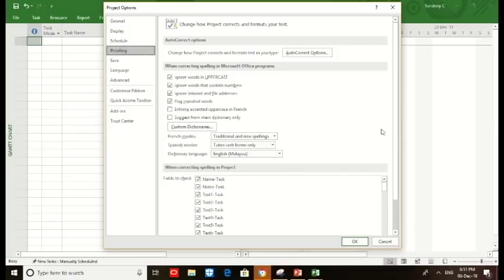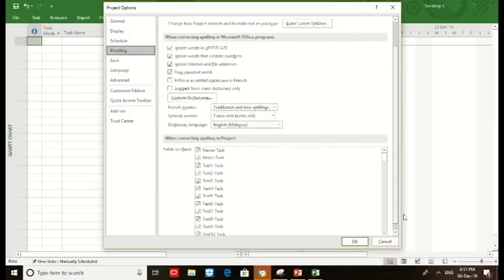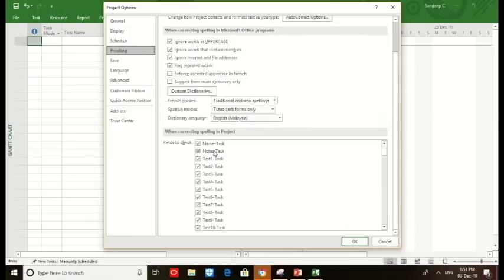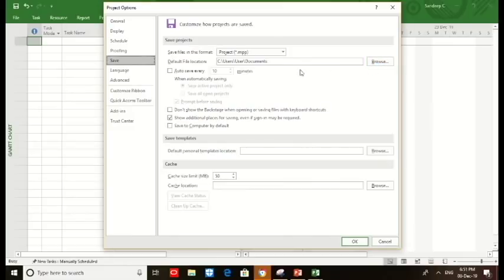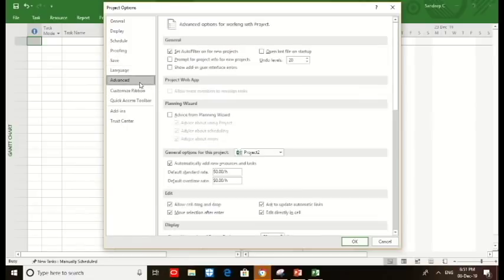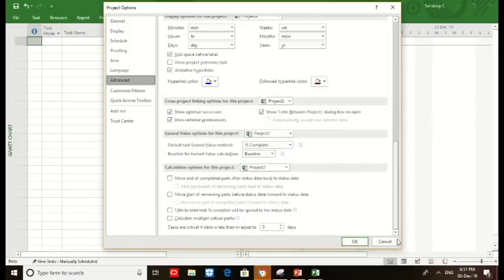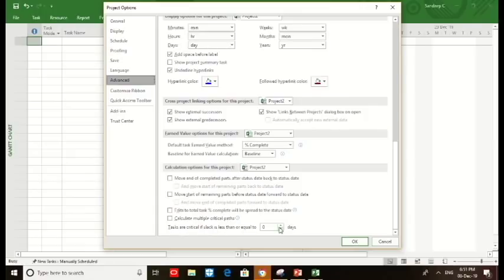Then we must choose the default fixed cost accrual as prorated, default task type as fixed unit. After this, we move on to proofing and save. You could choose a different folder for a project. Then we move on to the advanced section. We must make sure the critical path is calculated based on the slack of zero days and the default earned value method is percent complete.